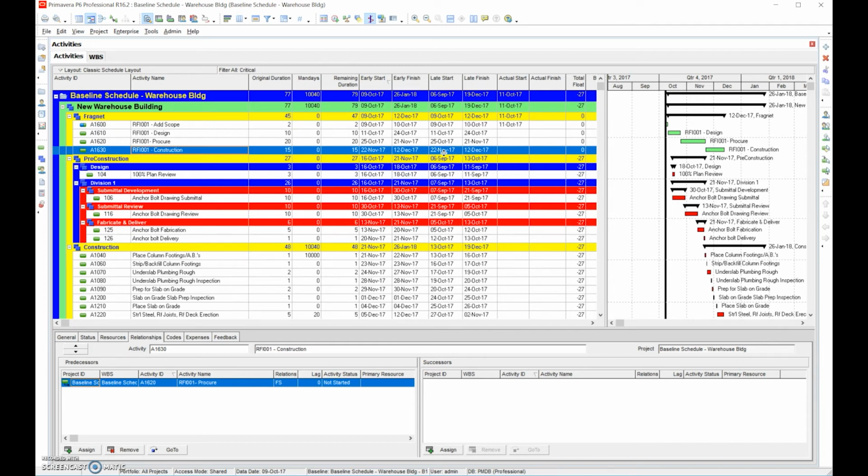Now, based on the schedule update, we got 69 days, right? But we also had a concurrent delay of 27, meaning that we had 27 days, they had 27 days. Our 27 days is because we're behind on productivity. Their 27 days is based on the added scope. Well, that becomes a wash, okay? At the end of the day, we got to kind of throw that out. That's why we subtracted 27 days from 69, which is the total negative float, and that means that we're only entitled to 42. That's called a concurrent delay.